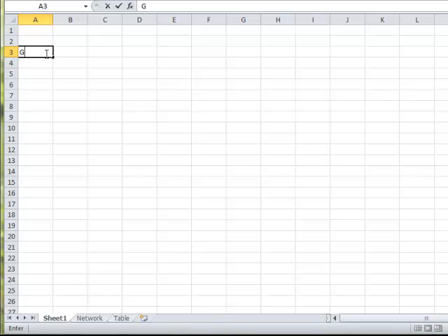So the first thing I would do is put in the given information in tabular form, and we have four activities, A and B and C and D. You're going to put those in, and then there are associated parameters for each of these activities. The first is the normal time versus the crash time. And you're going to have normal cost per unit of time versus crash cost per unit of time. It's like how many dollars per day, per week, or per month it costs under both conditions of normal process time and crash time.